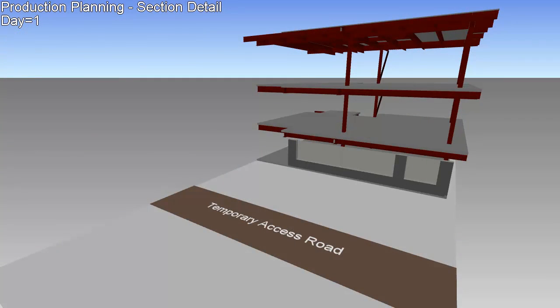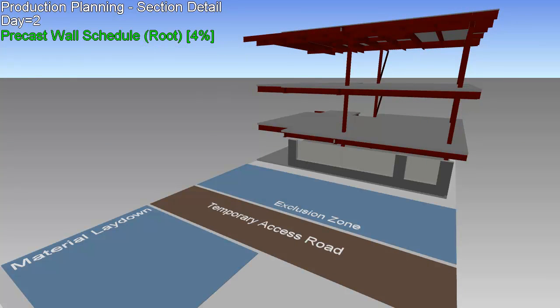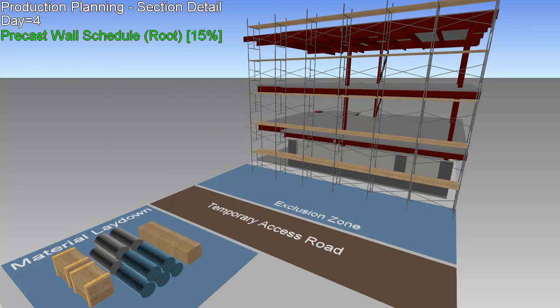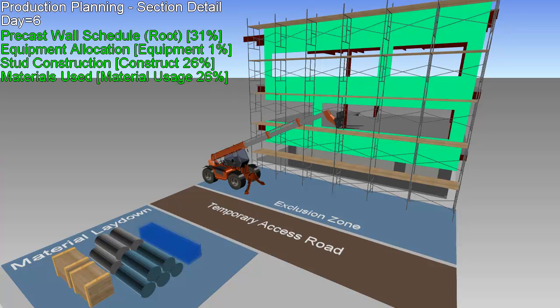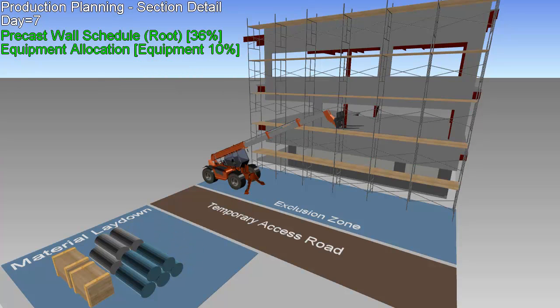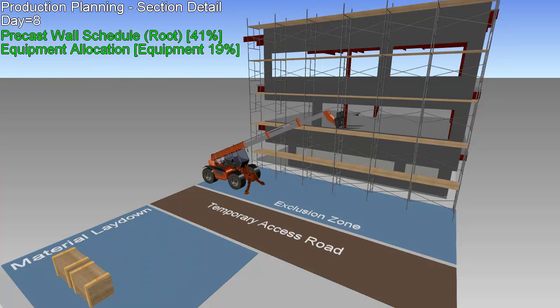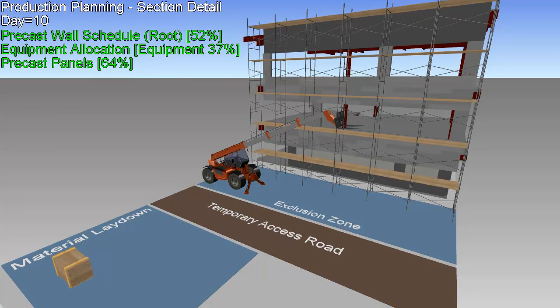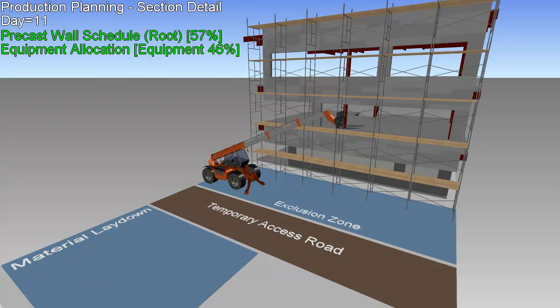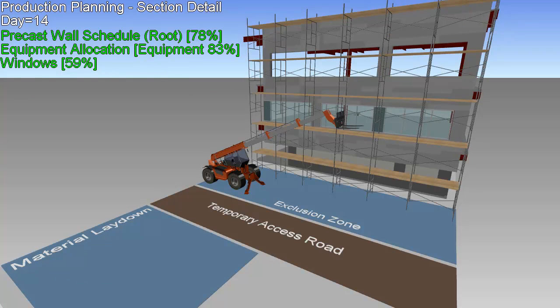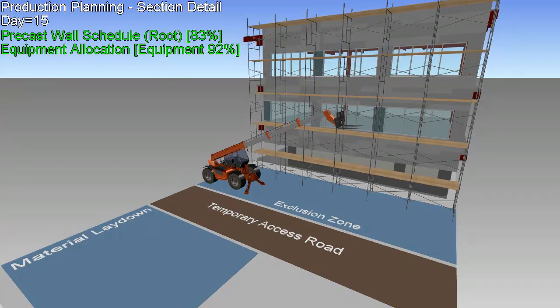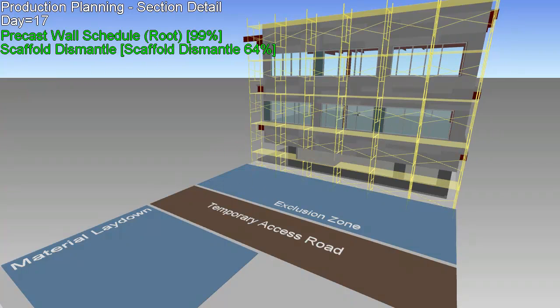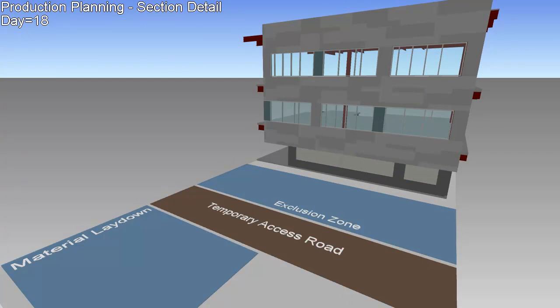These project planning tools can also be used to test and refine what-if scenarios before going to the field. Here we see a visualization of how the curtain wall panels and windows will be installed, including locations for the heavy equipment, staging areas for the materials, and safety considerations. By running through the scenarios virtually, the logistics of the activities can be worked out ahead of time, and opportunities for improvement found and tested before any of the work is actually done, saving time and reducing risk.